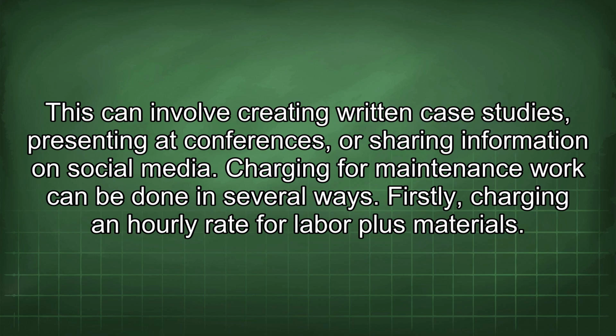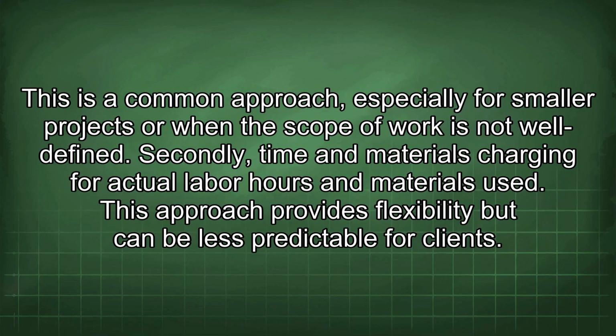Charging for maintenance work can be done in several ways. Firstly, charging an hourly rate for labor plus materials. This is a common approach, especially for smaller projects or when the scope of work is not well defined.